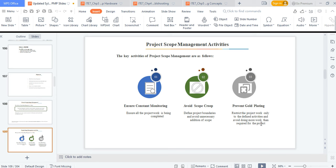Gold plating means doing more work than required — for instance, if someone asks you to roof their house and your scope document specifies a normal roofing sheet, but you feel the customer can afford more and add extra thinking he'll be happy and refer you to others. As project managers we should avoid that, because it adds to your risks, adds to your schedule, and affects your project. You want to ensure constant monitoring, avoid scope creep, and prevent gold plating.